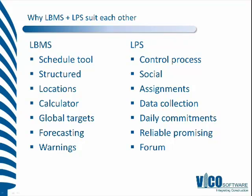From the location-based side, these forecasts initiate warnings to show where problems might occur and where root causes could be — clashing trades, people starting at the same time, or deviating from the plan. The Last Planner system provides a forum to discuss those problems and mitigate them early, offering a system to collect, analyze, flag information, and iron out the issues.